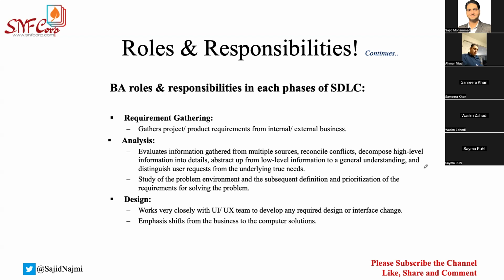When I'm asking, I need a big house, this is a very vague term, a very big requirement. I have to decompose this into smaller things. What do you mean by big house? The decomposing would be, I need 4 bedrooms. I need 2 bathrooms or 3 bathrooms, 3.5 bathrooms. I would need like a 500 square feet kind of backyard, all those things. So you have to decompose that into smaller chunks so that the requirements become more clear.